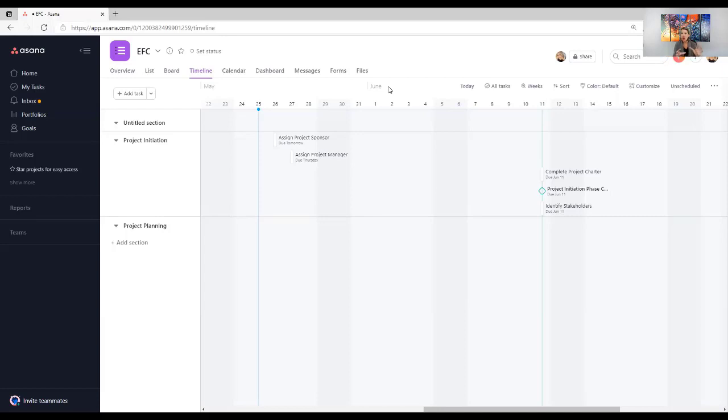So I want to show a relationship between these two versus having them look like standalone tasks. In order to do that, this is the shortcut, or in my opinion, a shortcut, at how to define those dependencies. If you hover over the task that you would like to link to another task, then you're going to see that there is a blue line with a ball that pops up at the top, a blue line with a ball that comes down to the bottom.